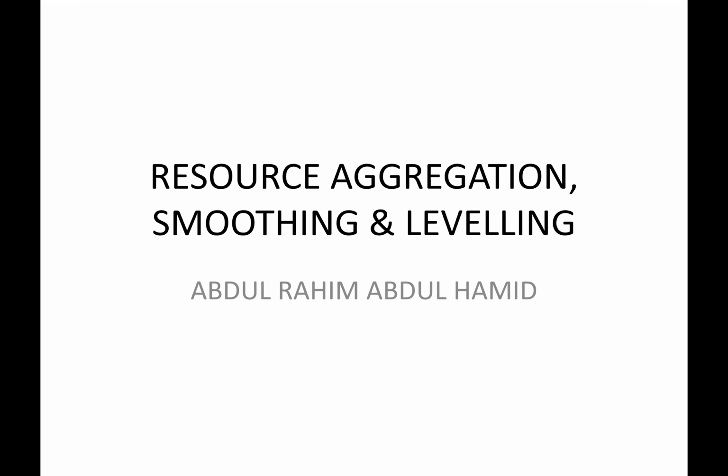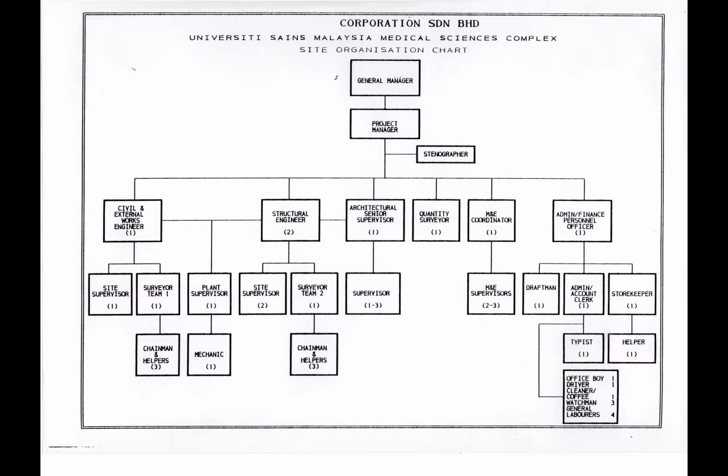In a real construction project, even during the tendering stage, you need to prepare what we call the organizational chart. Why is this organizational chart very important? For the client to see who the team are, whether they are capable or not, whether they are sufficient or not. And inside this team, you see there is a number of management team. This is what we call the management team.